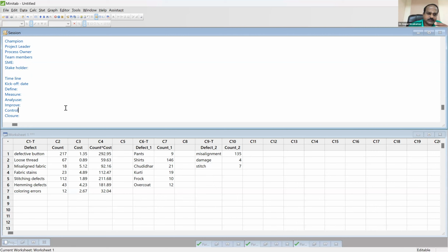But of course, project charter is a living document. If needed, you can modify and get it reapproved. So the initial proposal must be approved by the project sponsor. And for the approval of the project sponsor, the project leader and the finance controller, they must sign. Once their signatures are done, then it will be submitted to the project sponsor and then he can approve.